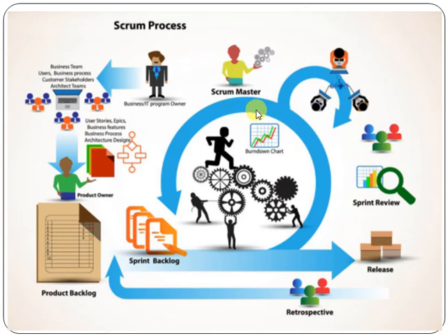And once the sprint has been developed, for example the 10 tasks have been developed, we conduct the sprint review meeting. Sprint review meeting means that we showcase our work to the customer, show how we have developed the 10 tasks, and get his feedback. Okay, in that way, the same procedure occurs again. And one important thing here is the sprint retrospective.